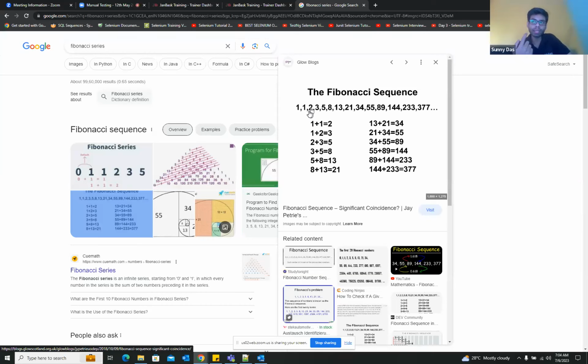If you are working on your own and giving the story point as 1 or 2, it should be completed in 2 days. But if you give the story point as 2 and 3 people are going to work on that story, then it should be completed within 1 or 1.5 days. There is no written rule for that, but this is something relative.